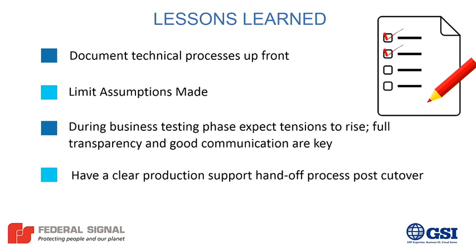Another one was our audit process. So we have workflow that we're using in JDE to approve project promotions. Because with 3,000 customizations, we got tired of the paperwork, right? So that audit functionality, our developers and our business analysts and our business users really just like to click the box, I approve this, take it to production. Well, it was looking at an audit history table for OMW. And of course, OMW is not the same in 9.1 and 9.2, and so we have to put the records in the table. And so there are little things like that where they take a week, and that's a lot of time when you're looking at a couple month project.